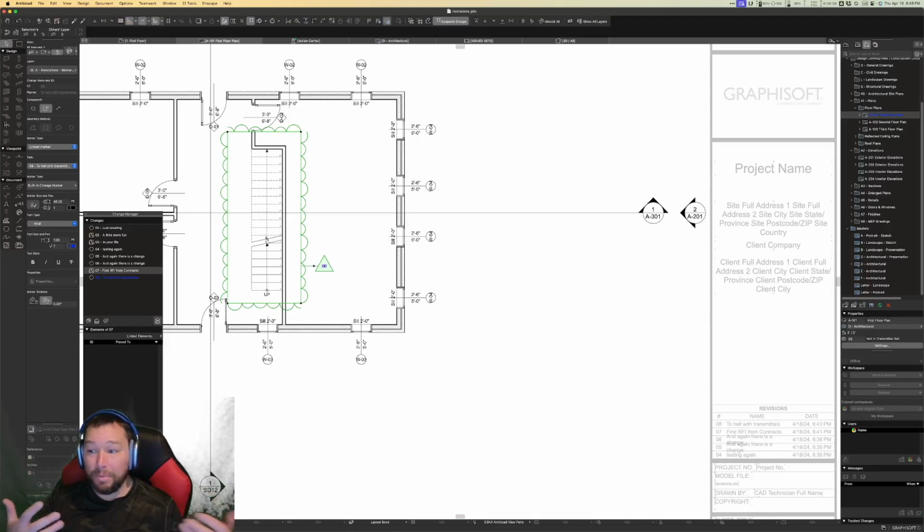Like I said, if it's a very simple project, I don't care. A lot of times, I just want this to be really simple, especially if it's a small single family house. I might have like three changes, and I don't want to deal with transmittals. That's extra clicking, extra stuff. Now, if it's a more complicated commercial project, yes, I'll use transmittals. Now, is it confusing? Yeah. So if you've got a larger staff, like if you've got drafters, use the transmittal system. But if it's just you, you can say to hell with transmittals.